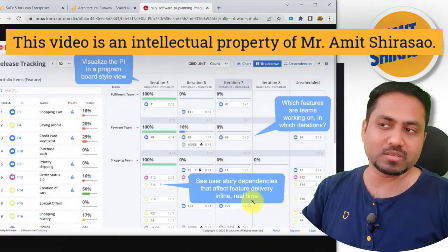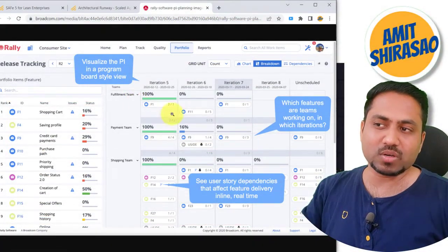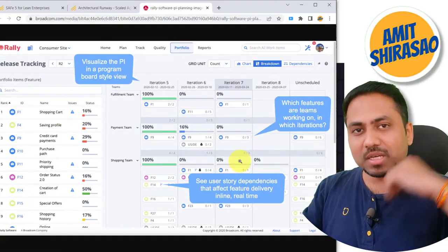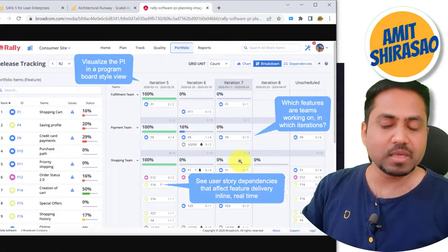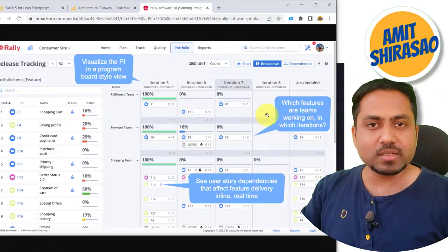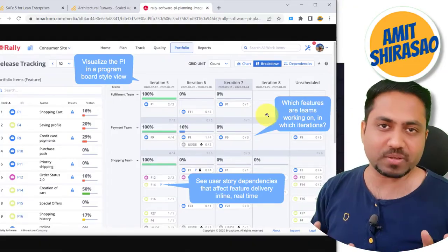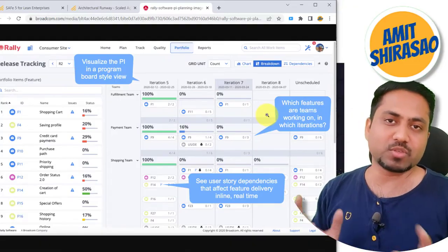So these are the 4 iterations that you are going to pick up. In these 4 iterations, you are just going to drag and drop your stories. Every other team is going to do the same thing. So if you are doing it, everyone knows that your team has picked up that story, so people won't pick up the same story again.